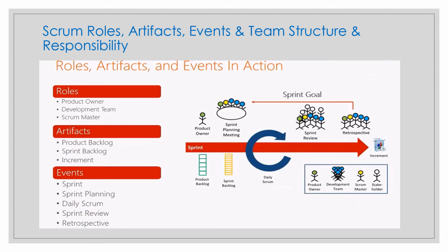If the product owner or the Scrum Master are actively working on an item in the sprint backlog, then they can participate as developers. This is again as per Scrum Guide 2020 in daily Scrum. If the product owner and Scrum Master are actively participating in your backlog item, they can participate. No external people are allowed. The developers can start, and all the people will be there in the daily Scrum.